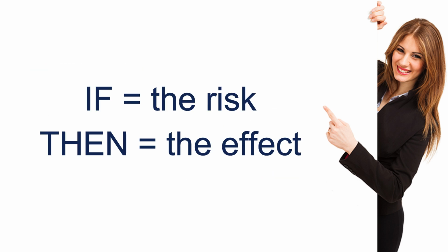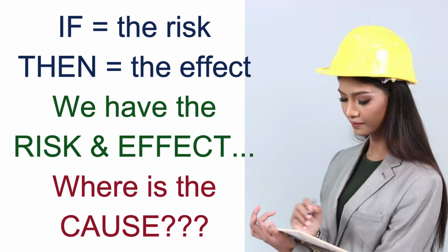If is the risk, in other words. So if is the risk, then is the effect. If the euro goes up higher, then our cost is going to be more. If the euro goes higher is the risk. But the question is, what's making you think that the euro could go up? What is the general condition or the cause for this concern?